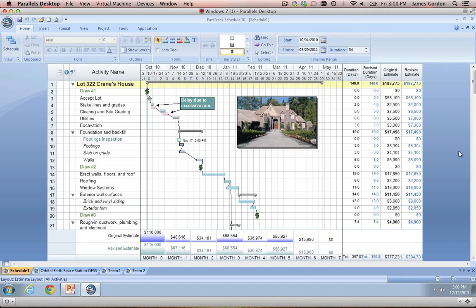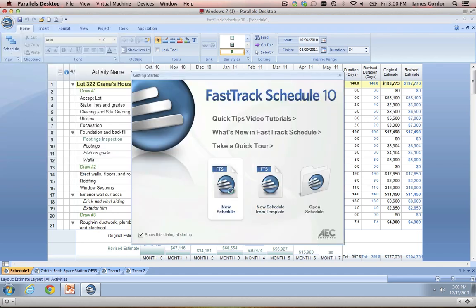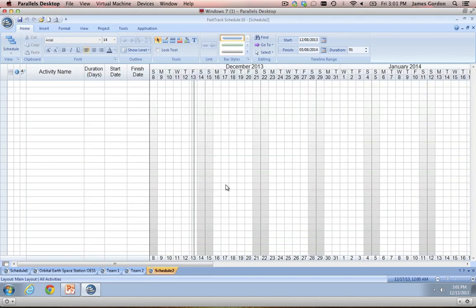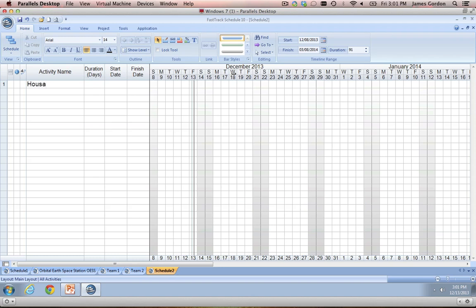So those are the three or four main views of FastTrack Schedule. Now let's go ahead and flip to a blank schedule and go through some of the fundamentals of building out a schedule from scratch. For this example file, we'll use the example of building a house once again. We'll call our overall project name House A. Then to go down to our next row, all we need to do is press the return or enter key. Then we're going to want to indent these tasks to show that they're under our overall project name — we can press either the tab key or use the arrow keys to indent. Let's go ahead and create a simple task list.